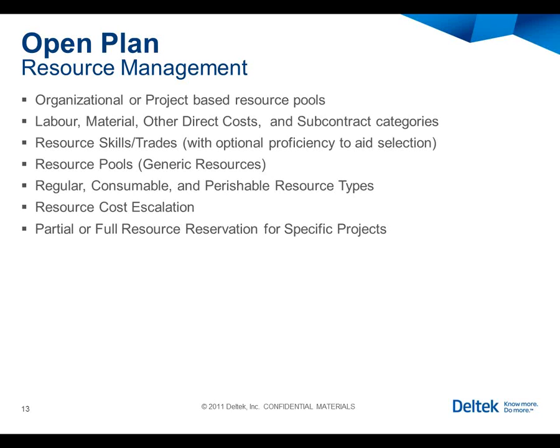Costs can be escalated over time, and we can define partial and full resource reservations. A resource reservation is one in which we define a resource's availability, either in full or in part, to a specific project.